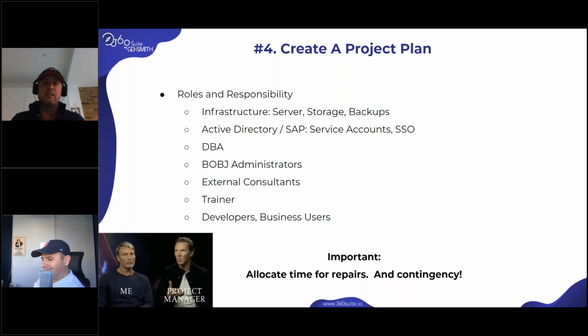All of these things sound obvious, but I'm telling you, in bigger companies, and I'm sure some of you will relate to this, if you don't have all the right prerequisites in the right order at the right time, it creates massive delays. So again, project plan, and I'll show you an example on the next slide. Have a project plan, make sure everybody knows what they have to do by when. Do expect that you need to repair things, so allocate time for that.